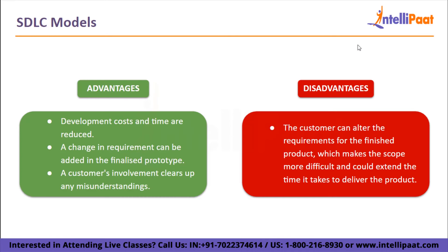The waterfall model approach is used to construct the actual software. For advantages, because flaws are discovered earlier during prototype models, development costs and time are reduced. Missing features or lack of functionality can be found during assessment and added to the finalized prototype. Customer involvement from the beginning clears up misunderstandings about functionality requirements. For the disadvantage, the customer can alter requirements for the finished product at every stage, making scope more difficult and potentially extending delivery time.